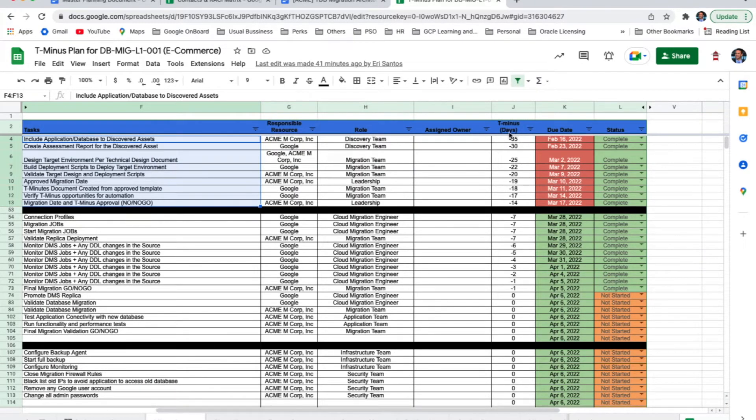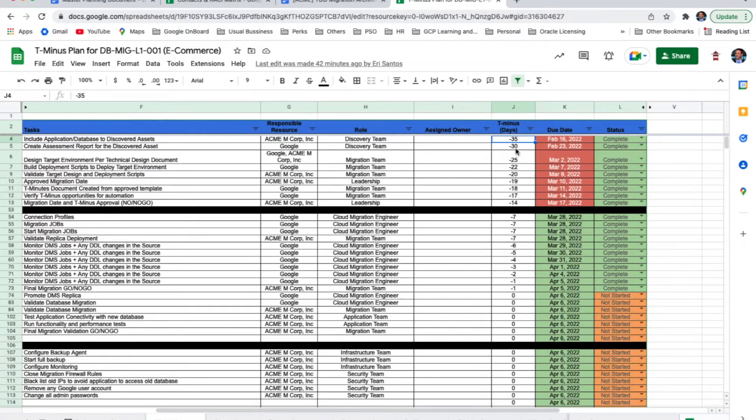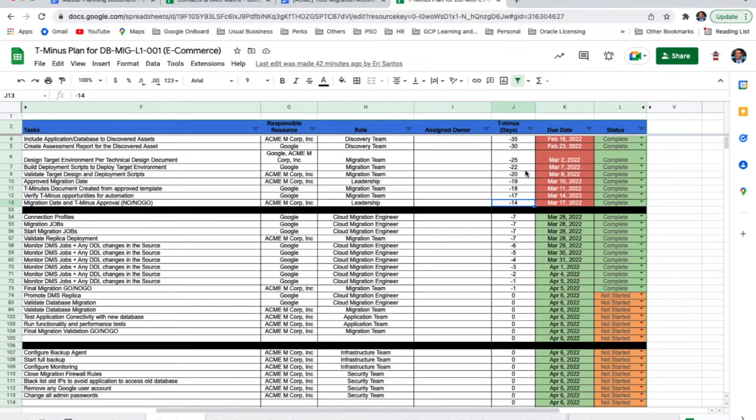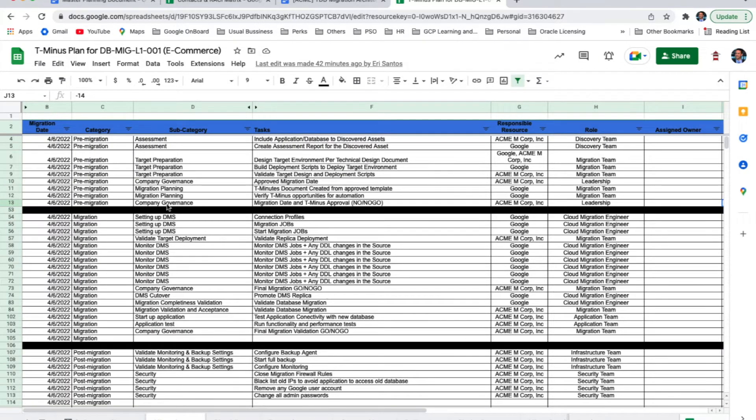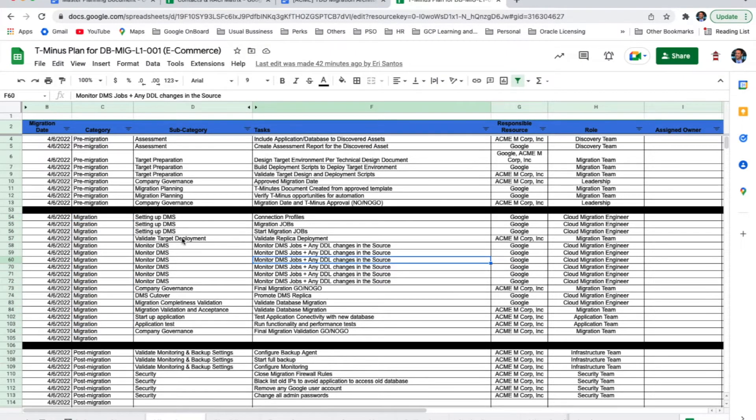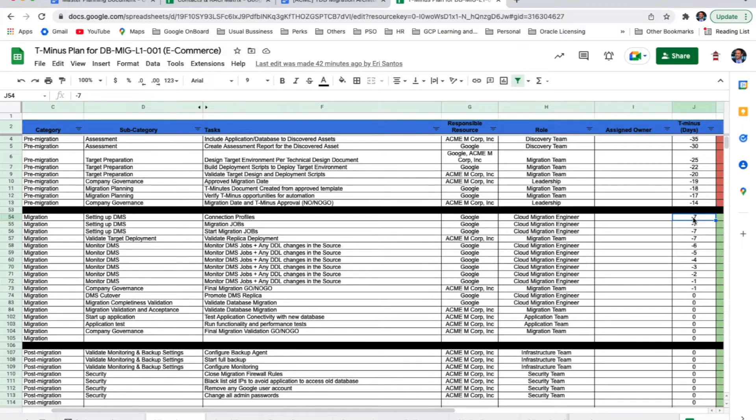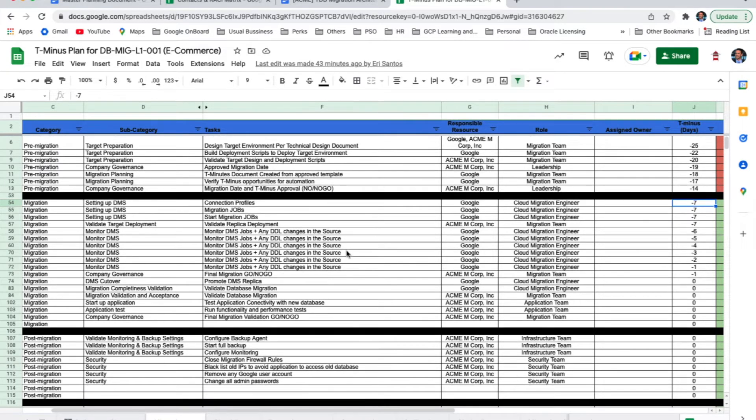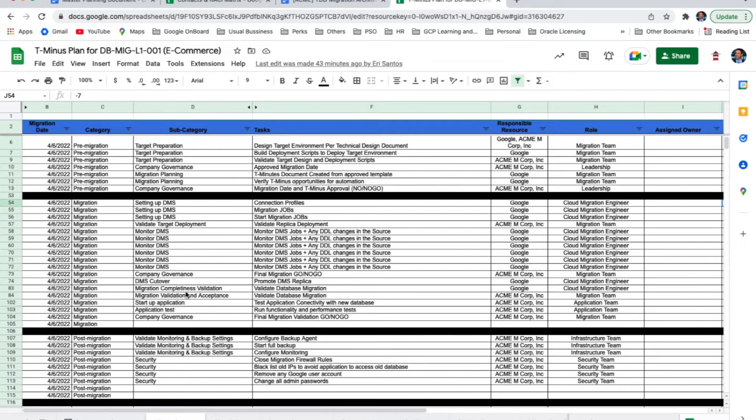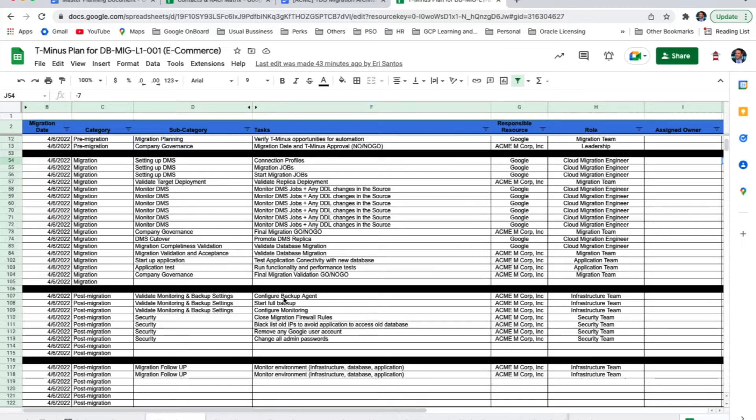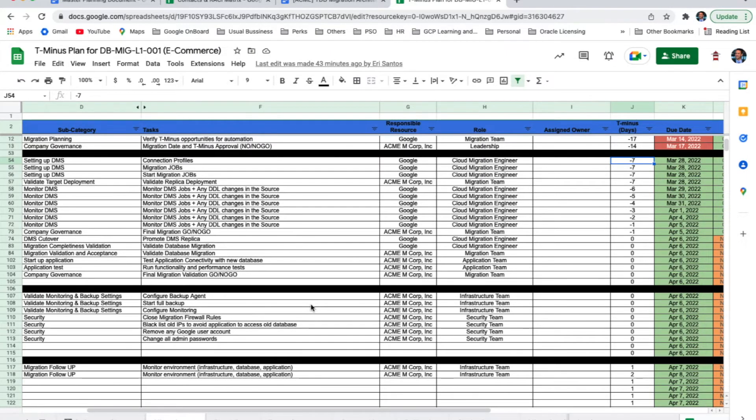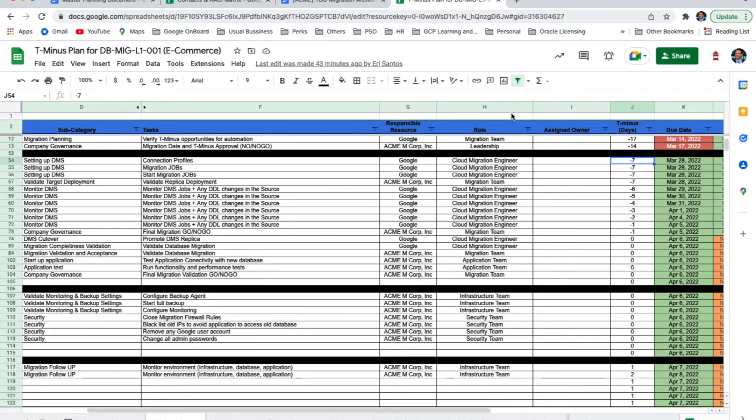Next section would be migration. In this example, we are setting up a DMS environment for migrating our on-premise database. Because of that, we are starting the migration actually seven days out. So, we are going to establish a CDC between the source and the target environment. And we are going to have that replication going on until it is time to promote the replica. Post migration steps are also described in here. Everything that needs to be done from the security standpoint all the way to backup and monitoring is going to be included here. And also, if this is a critical environment, one or two days after that, that environment might be in scope for closer monitoring. And that concludes our demo for all the template documents.